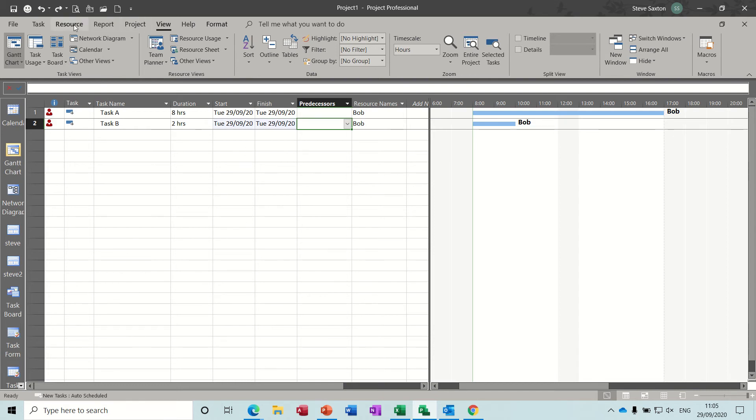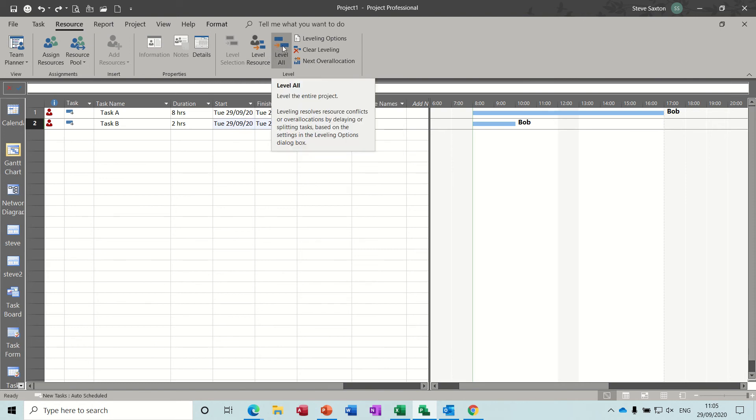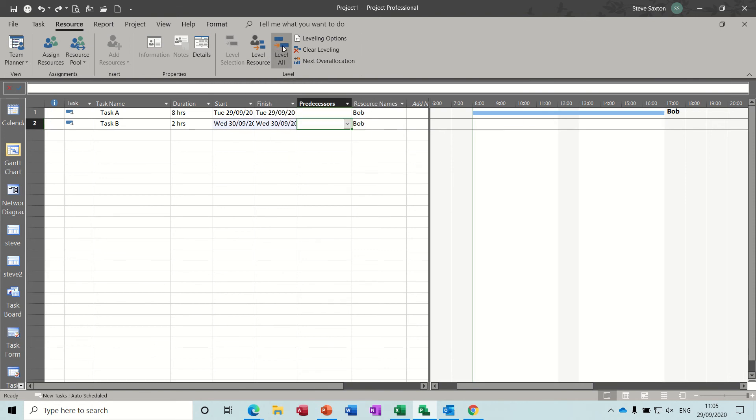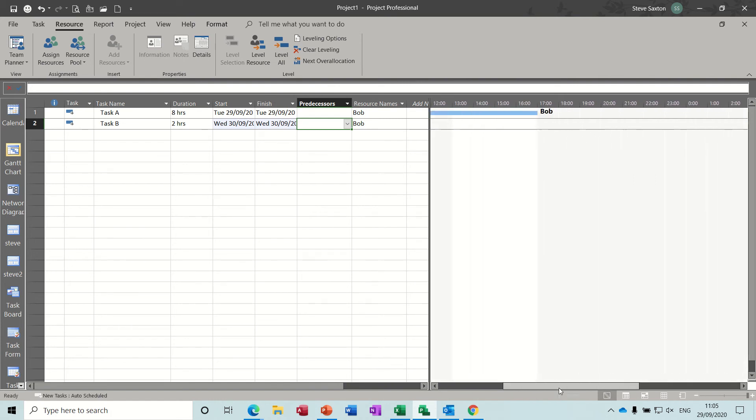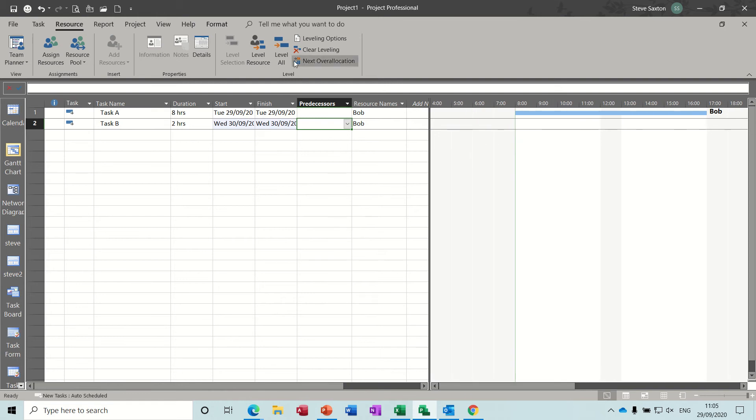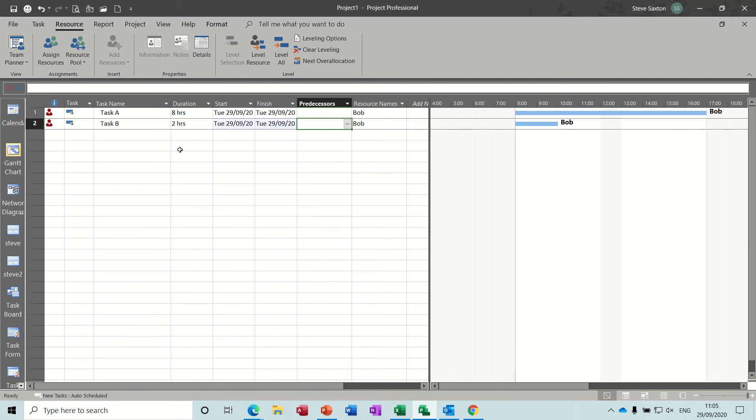You could also go to resource leveling, level resource, level all. I'll do because there's only one resource, level all, that does exactly the same. It's just moved on to a second day. I've got the timeline down as hours at the moment, so you can see it's on the second day, eight o'clock.